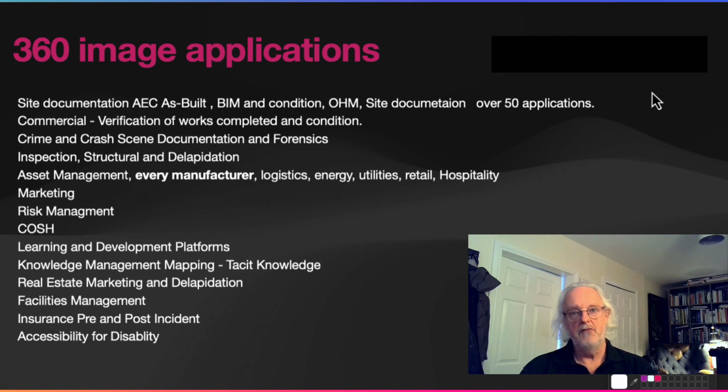One, it means that more people can actually tender and they're not limited by the distance that they've got to go for a site visit. And the second thing is, what people are finding is that they are getting more information so they can make a more accurate bid without having to put in contingency fees for undiscovered or unknown issues.